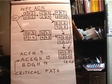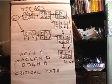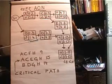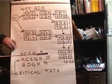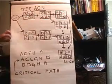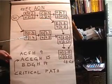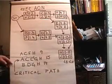So if we had to choose one activity that we were going to delay for some reason, we would probably choose activity F because we have the slack on that activity. So by doing the forward pass and the backwards pass on a real project, that's the easiest way to calculate the slack as opposed to enumerating all the possibilities.